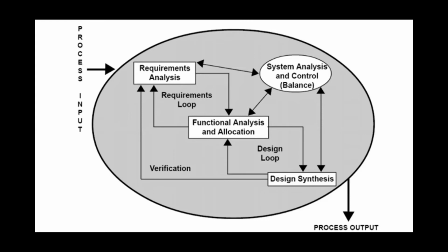Your first concept is to build with 2 support systems, and then you did surveys and realize it will need more support, that kind of a structure, it will need retaining walls and whatnot. So the more information, the more design you do, the more surveys, the more chances there are that you will impact the initial requirements. And you might change your derived requirements. You might change the way you were looking at things 6 months ago because you didn't have that information.